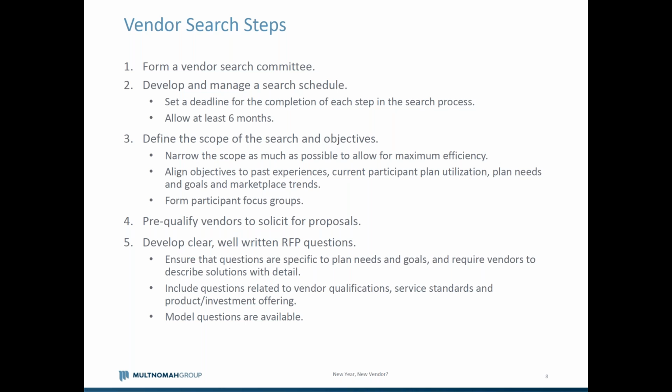Once the timeline's been set, the next thing is to define the scope of the search and the objectives. I think it's important to narrow the scope as much as possible and have a clear understanding of what it is you're trying to accomplish. In some cases, if you're just trying to gauge where the market is, you may narrow the scope by limiting the number of vendors that you're going to submit this RFP to. In some cases, you may narrow the scope by focusing more just on pricing as kind of a first level evaluation before diving into services.